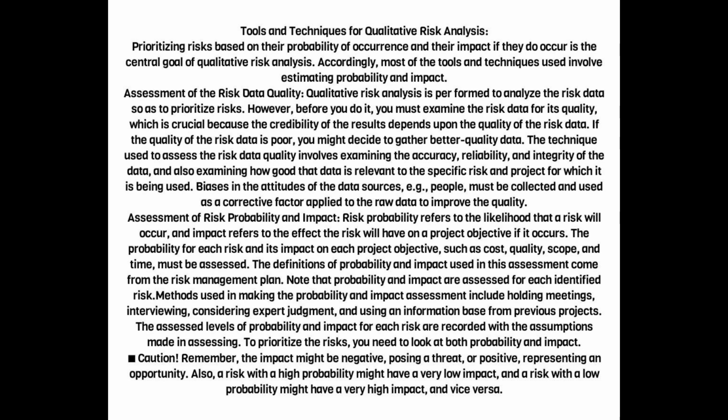Assessment of the risk data quality. Qualitative risk analysis is performed to analyze the risk data so as to prioritize risks. However, before you do it, you must examine the risk data for its quality, which is crucial because the credibility of the results depends upon the quality of the risk data. If the quality of the risk data is poor, you might decide to gather better quality data.